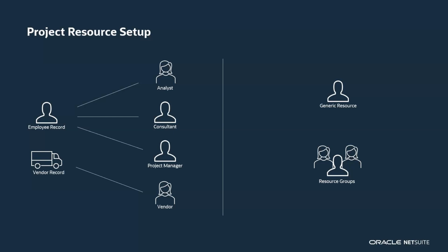Resource groups enable you to create a group of resources to be assigned together to a single project. For example, if you have a group of engineers that typically works on a task together, you can create a resource group for those engineers.